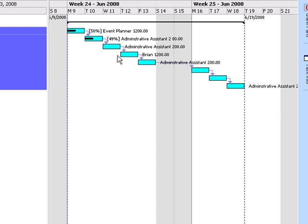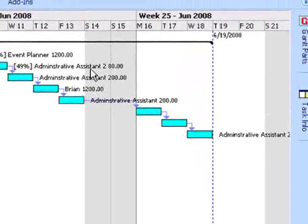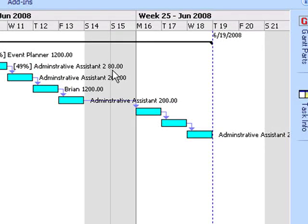In this case, when one task finishes, another one starts. You'll also notice that it put the resources and also the cost based on what each individual resource will cost.